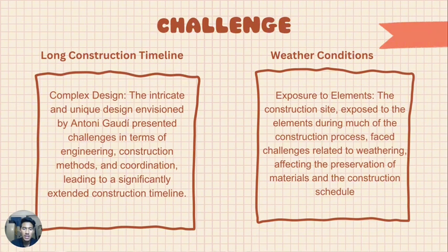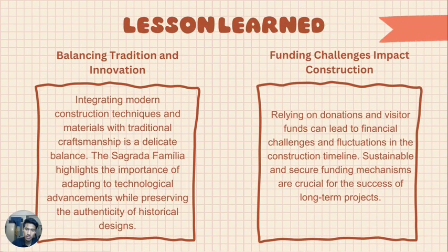So the other challenge is weather condition. Okay, exposure to the elements: the construction site was exposed to the elements during much of the construction process, facing challenges related to weathering, affecting the preservation of material and construction schedule.